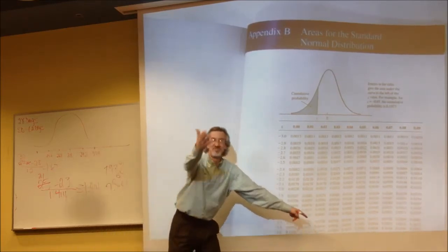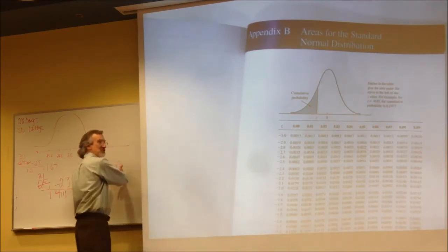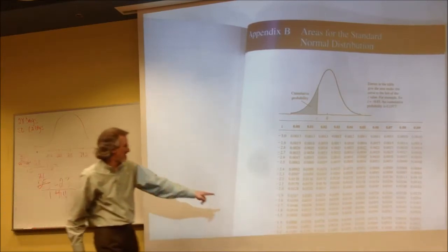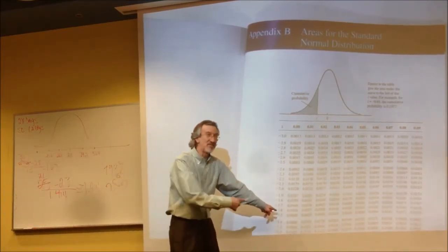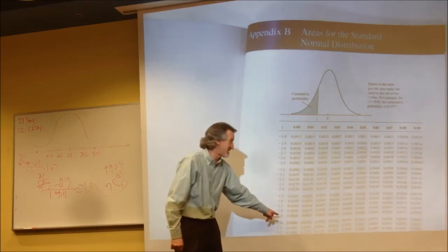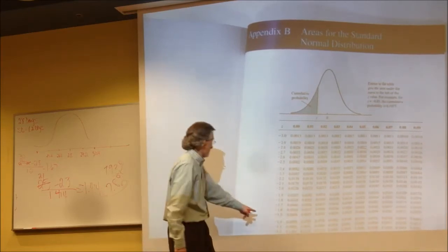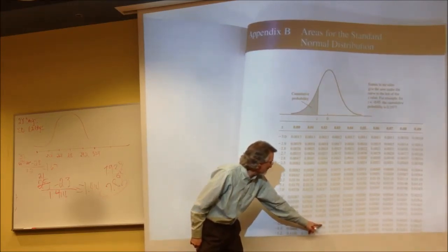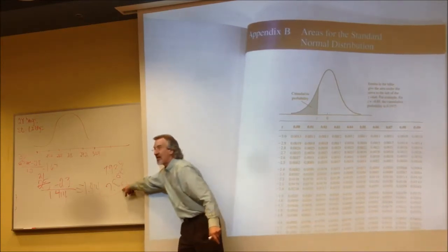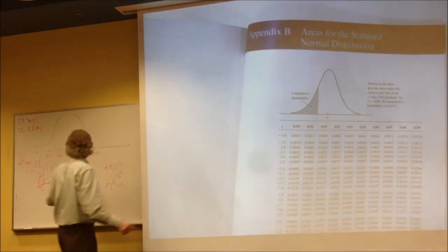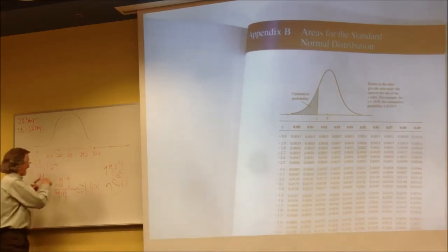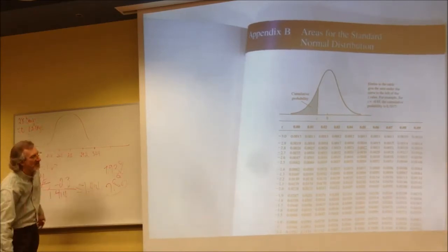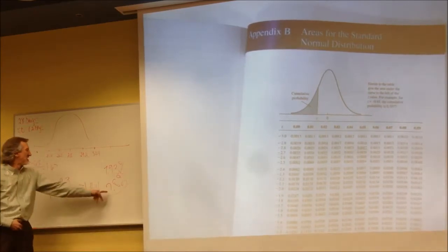Which is the answers we were talking about for the other one because we were doing no more. And we happen to have the exact same, but a negative. In fact, I used to always look up the opposite just so I wouldn't have to subtract it from 100%, which did save me time. What is this, 1.41? I don't want to lose anybody with this confusion right now. But 7.93% or 7.78% or anything between there, like 7.8%, if I was asking for 21 days or less. So if I said, what's the probability it would take 21 days or more, it will be the opposite of that, 80 something percent, 82.2%.